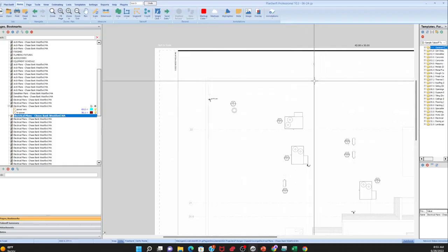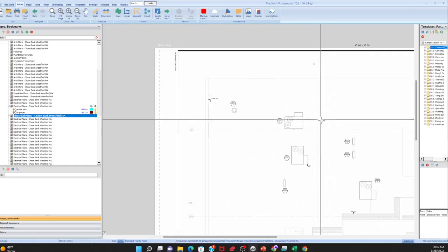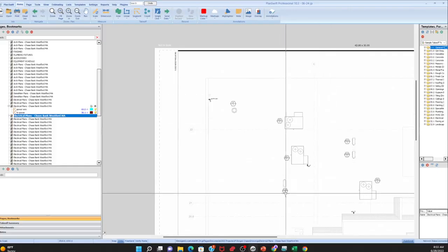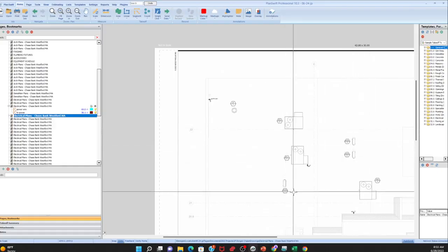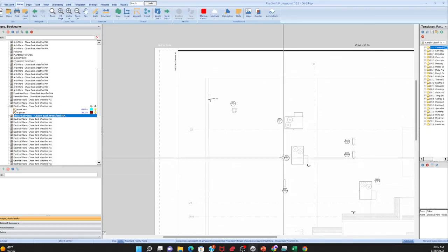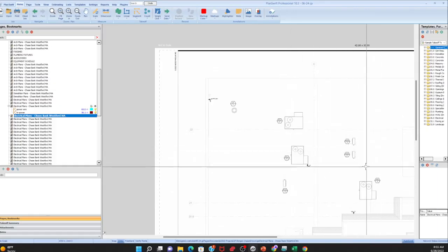And then when it's on the roof, I add 10 feet, right? Because we got to go down. So I automatically add 10 feet on anything that's on the roof. So if I had to connect all of these, I do the same thing. But I think these are already existing, or else they would tell us something. We had to do something with them, right? If they're already existing, then it's not telling us to do nothing.